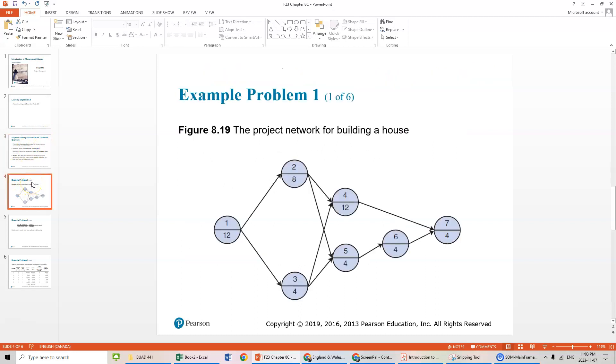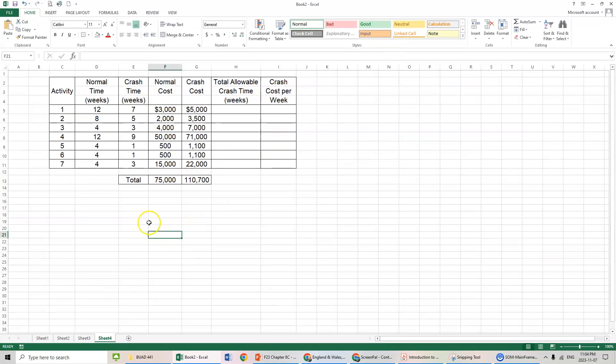So we go back to our example of building a house. We have those seven activities from our first video, first section within this chapter. There's various activities and times. The time element when we first did this was in months. We're changing this to weeks just to make it a little more easily understood. Here is our normal time. Activity 1 before was 4 months, now it's 12 weeks. Activity 2, 8 weeks, 2 months, and so forth. We have the total normal cost of each activity in regards to the normal time. So our project is going to cost us $75,000 if we use the normal time.